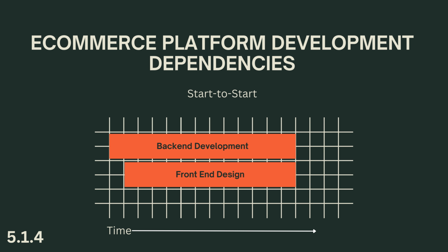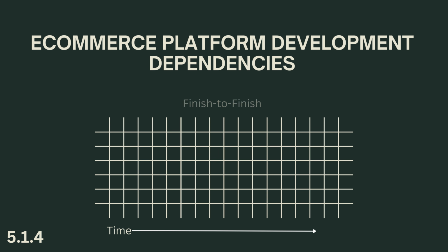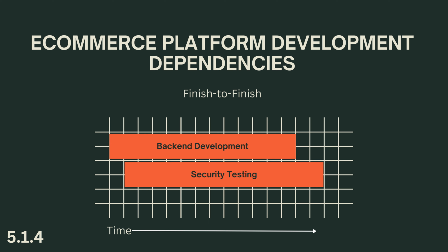Next, let's look at start to start. In our project, front-end design can start once back-end development has begun. They don't need to be fully in sync, but the front-end team needs some understanding of the back-end structure to start their work. They might begin with wireframes or basic layouts, while the back-end team is setting up the database structure. For finish to finish, consider security testing and back-end development.